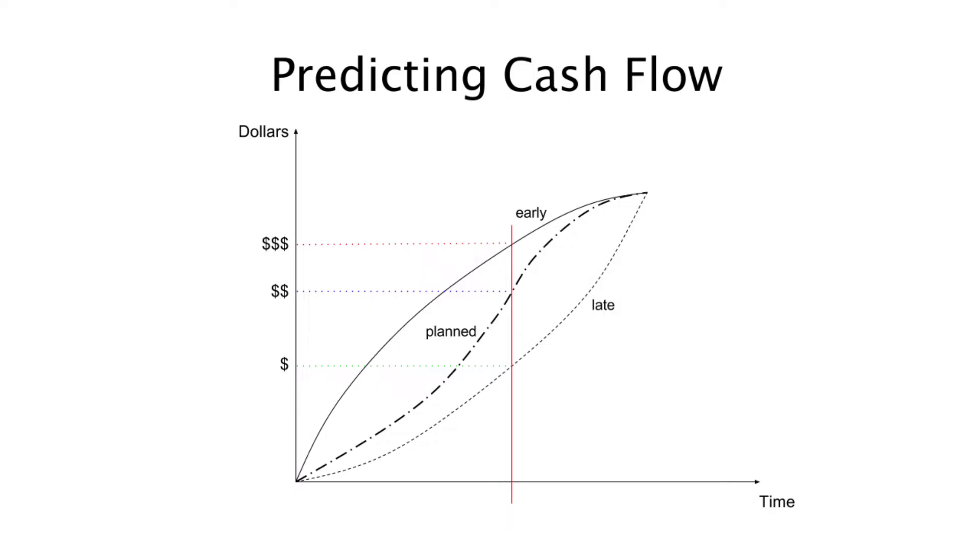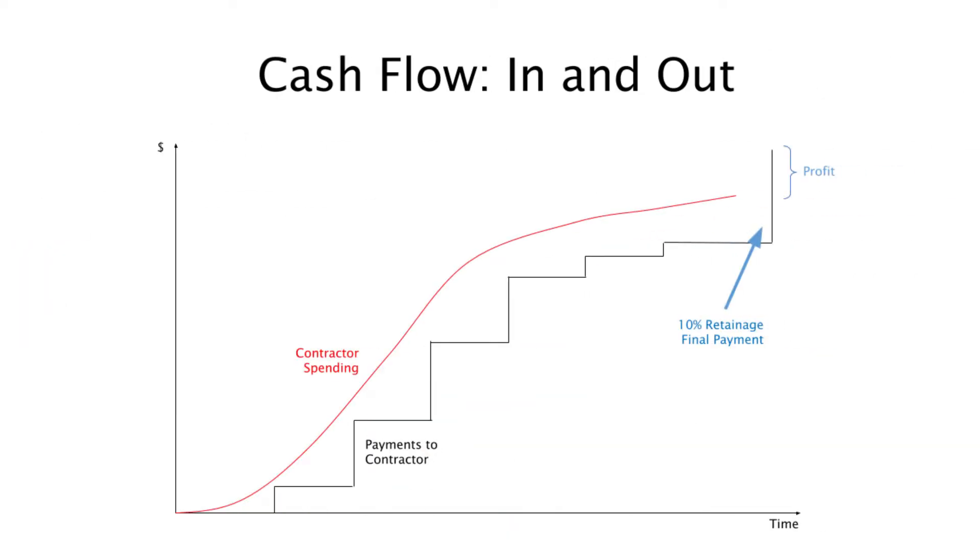At the bottom of that graph, you'll see the late curve, and that's if we do things as late as possible. In reality, it's probably going to be in between. We're not going to do all activities as early as possible and we're not going to do them as late as possible, somewhere in between.